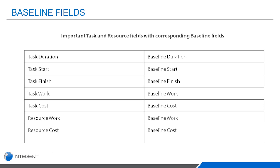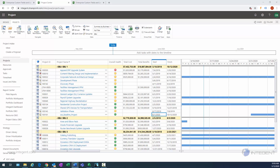When it comes to baselines, there are a number of different fields that are saved as part of this baseline process. You have task fields — task duration, work, cost, as well as start and finish — and you also have resource fields and summary level fields that are going to be saved. You can save the baseline in a couple of different places: you can save it in Project Online when you're web editing, and you can save it in the desktop client as well. You do have many more capabilities in the client for saving baselines.